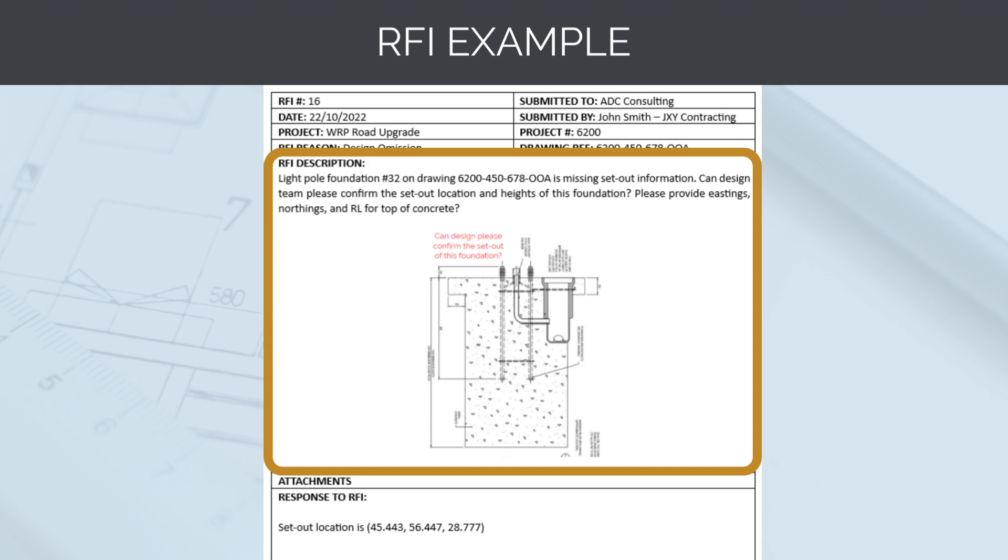Light pole foundation number 32 is missing set-out information. Can the design team please confirm the set-out location and heights of the foundation? Please provide eastings, northings, and top of concrete. A markup of the foundation in question has also been provided on the RFI form.